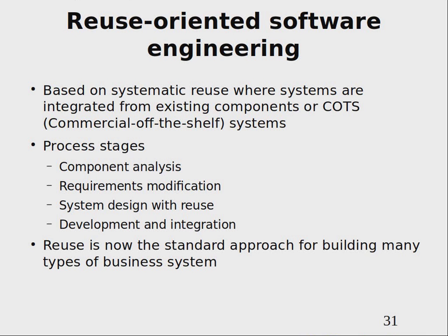Then again, this approach is a little bit different, because with the waterfall or V-model approach, you start, at least in their model, with the collection of requirements. Here you actually need to, for example, review what you already have in your previous system, how it can be reused, and how it can be extended or redesigned for use in a different situation.